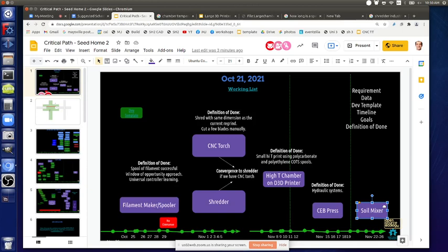So the other assumption here is for the 12 person thing, we have to work off a clear existing design. So it's more like the extreme manufacturing style where we've got plans, we're not changing anything. Everything goes according to plan, but we have the other controller, which is not universal controller based. It's still an Arduino with a selector switch for the brick thickness and solenoid controls and pressure sensor and stuff like that. So we build that. We wouldn't have enough time to innovate on the adaptation of the universal controller. Largely it would be functionality things like packaging, and there's a bunch of detail that goes into that. But we could replicate what we know.